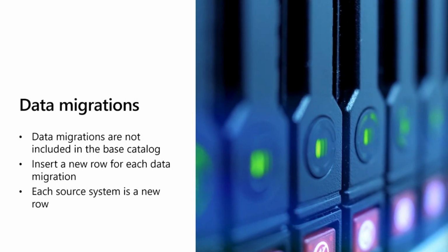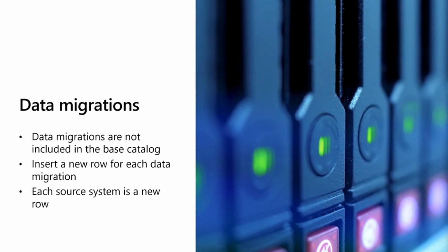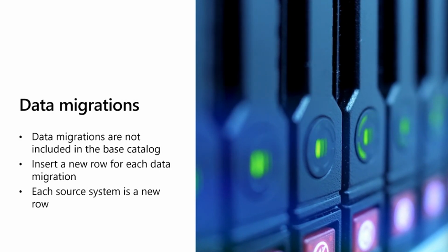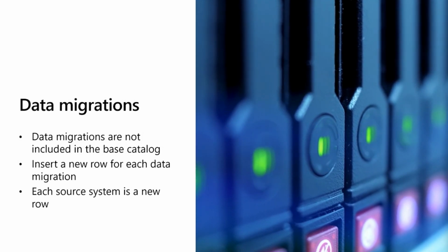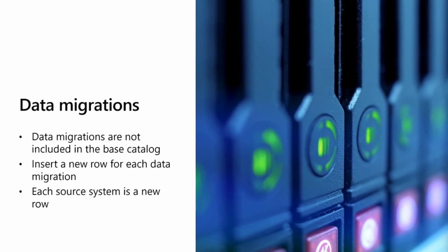Keep in mind that if there's going to be additional deduping or other things like that that you identify in the discovery phase for your customer data, you'll want to make sure that you create tasks for those as well, because those processes can be more time consuming than the actual process of migrating data itself. So make sure that you're thinking about that when you're thinking about your data migrations.